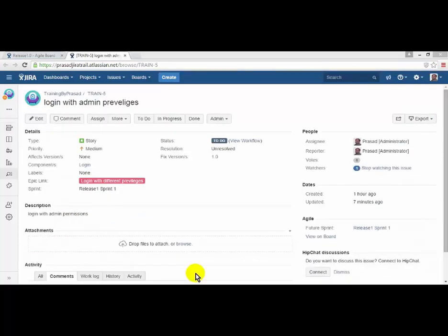As part of your sprint planning meeting, you will be creating the subtask for each and every identified issue for the current sprint. So for the first sprint, we identified three issues to implement, and for these three issues, what work needs to be done by the team. So the developer may need to do some work for that particular user story. The testing team may need some time to work with that particular user story.